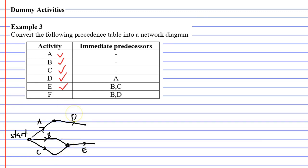Now some of you might think you can fix this with a dummy activity, like so. Now because a dummy activity has a weight of 0, edge B connects directly to the end of edge D. The problem being that edge C also connects directly to the end of edge D. We only want edge B to connect here.